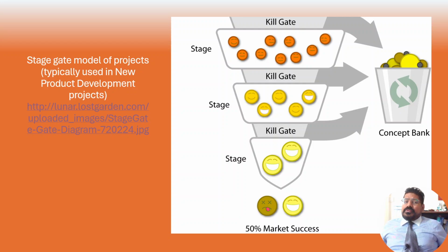a project, as a project manager, your job is to look back at the documents which were needs assessment, feasibility study, business case, project charter, stakeholder register high level, and risk register high level. These are the artifacts of the initiation phase. Your job is to see whether the need with which we started the project is still there or not, because it may so happen that you deliver the project within scope, within time, within cost, but the need was not captured correctly. So even if you deliver the project on time, within budget, and within the scope, your organization will not move ahead.